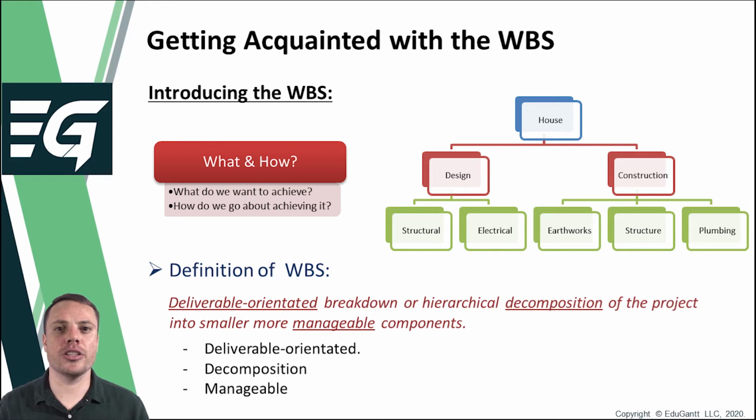The work breakdown structure is also used in subsequent planning activities to determine other information required for the thorough planning of the project. The work breakdown structure, or the WBS, can be defined as a deliverable-oriented breakdown or hierarchical decomposition of the project into smaller, more manageable components. In order to better understand the importance of the WBS and how it fits into project management, we will be taking a closer look at the main aspects of the WBS definition, captured by three phrases which are deliverable-oriented, decomposition, and manageable.